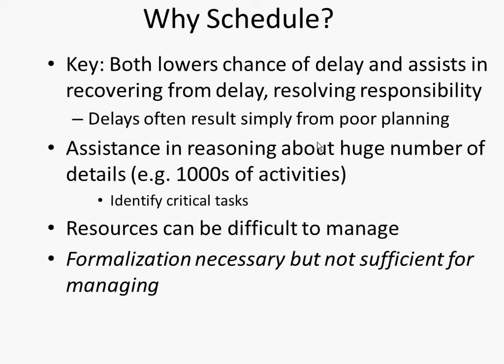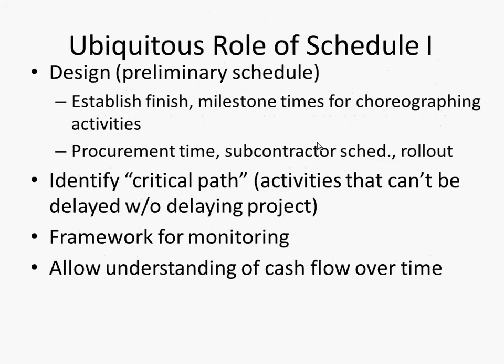So here we have to really take it seriously. What are these different components that have to be coordinated? Even for your projects of 3 weeks in length, there are going to be many tasks, some of which can be done in parallel and some of which can't be. Some depend on others. Our test team lead has to create the descriptions of the tests before we can build the test matrix, before that matrix can be peer reviewed.